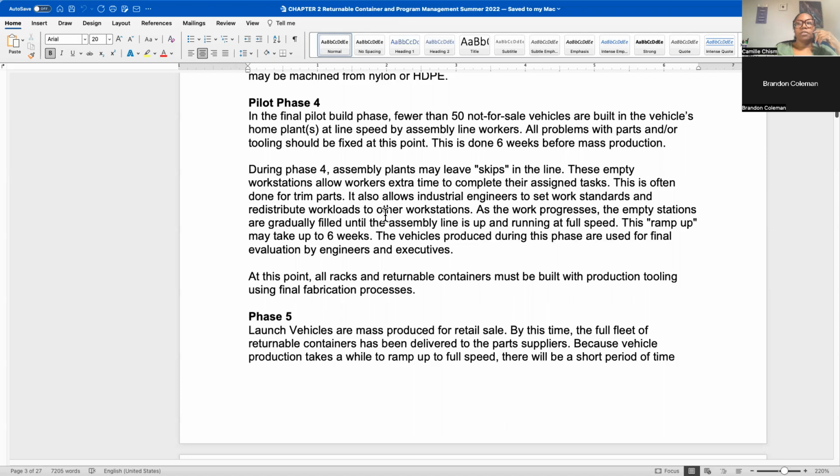So it's hard. You want to make sure that you're seeing, at the very least, understand which of your products are going to be new, which packaging is going to be different, and those are the ones you want to focus on. So if you're taking the same engine, leveraging the same packaging, it's not as big of a deal. But if you've made changes on the engine, you're going from like a 4-cylinder straight, 4-cylinder to like a V6 engine, you're going to have to look at all new packaging, keep those things in mind.